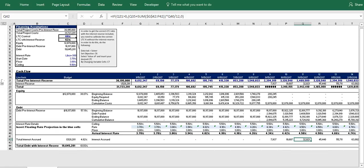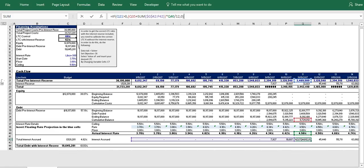Now a key thing to remember is that when you capitalize the interest, you're now paying interest on interest. So if you look at the formula here, you can see that we're paying interest on both the cumulative balance of the loan and the interest as well. And since we're here, I briefly want to show how our interest is being calculated.